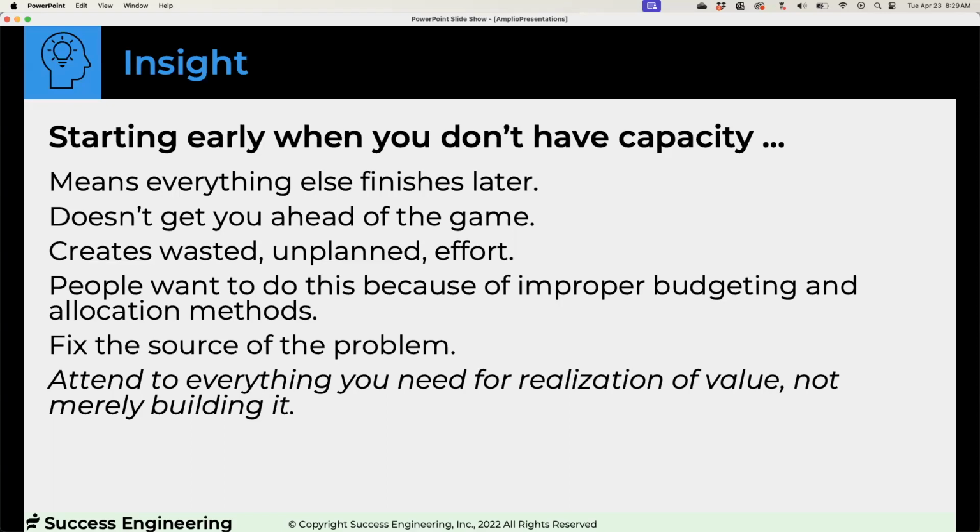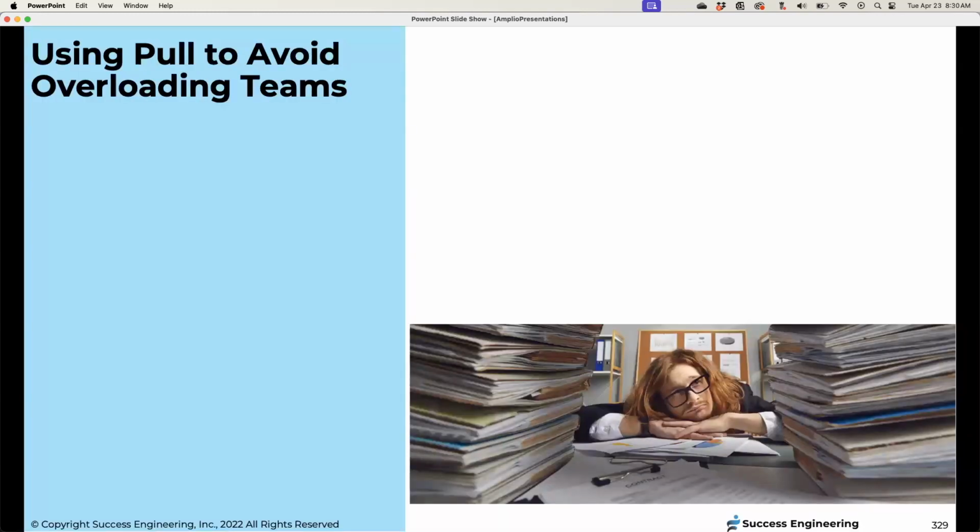There's a concept called full kitting that comes out of theory of constraints that says don't start unless you can finish. Like you wouldn't start a painting job unless you had the paint, the drop cloths, the ladders. Don't start building something unless you have in place a plan for how to market it, how to sell it, how to support it. Otherwise, it's going to get done, it's going to get on your release machines, and nothing else will happen until that's done. So you've injected delays without this. I'm not going to go into how to do that, but that's also straightforward.